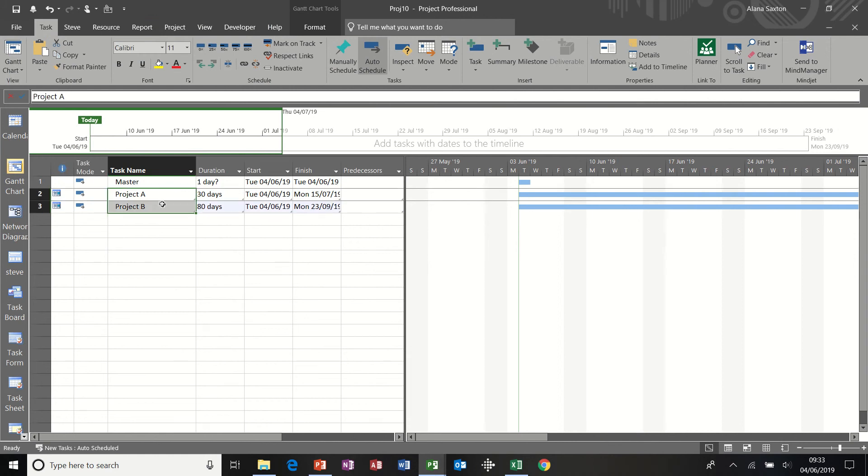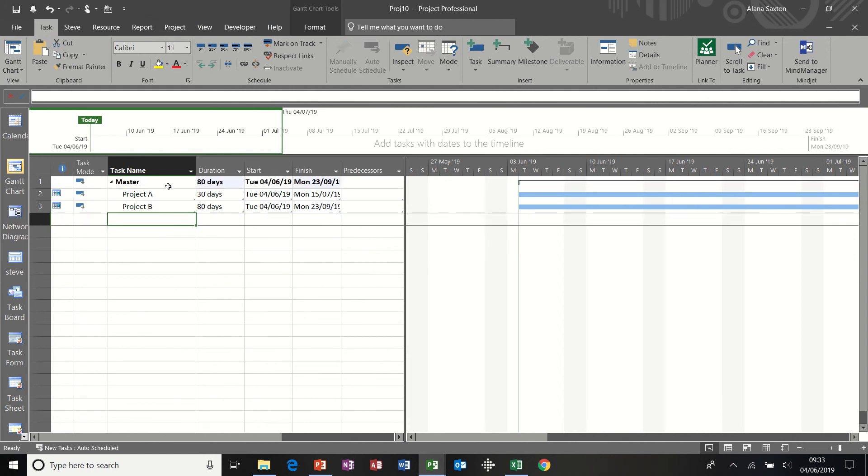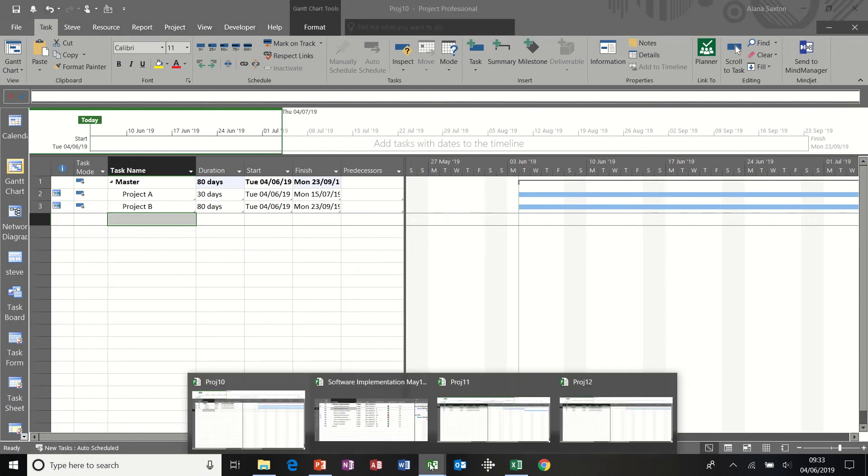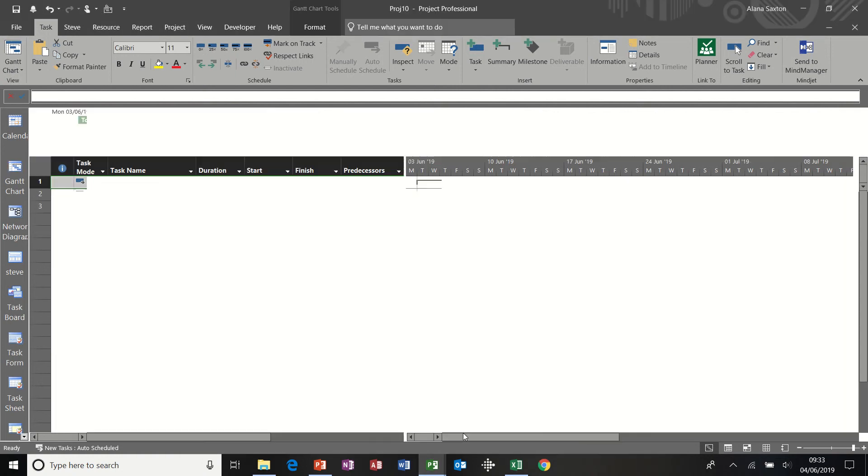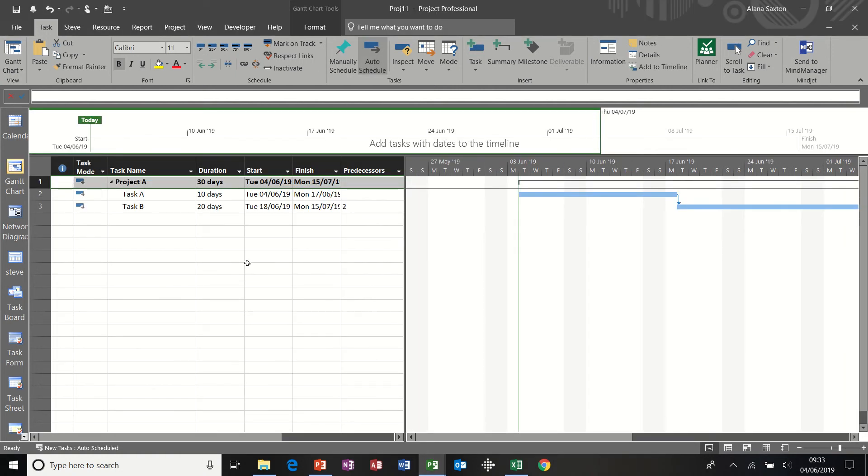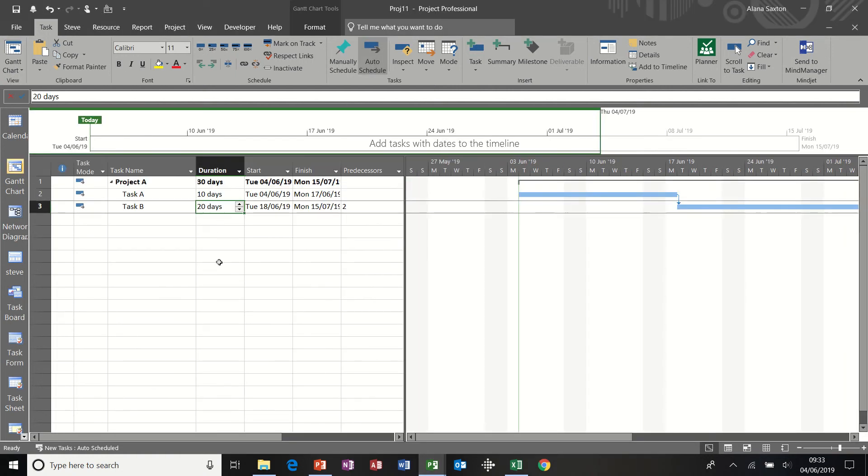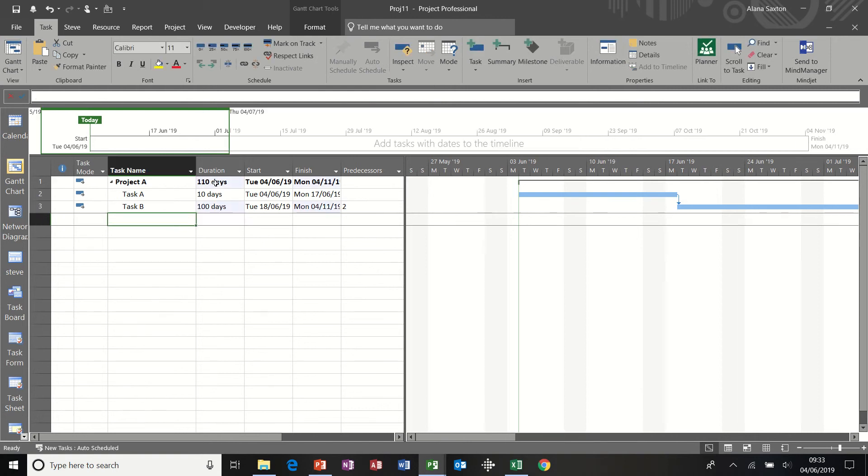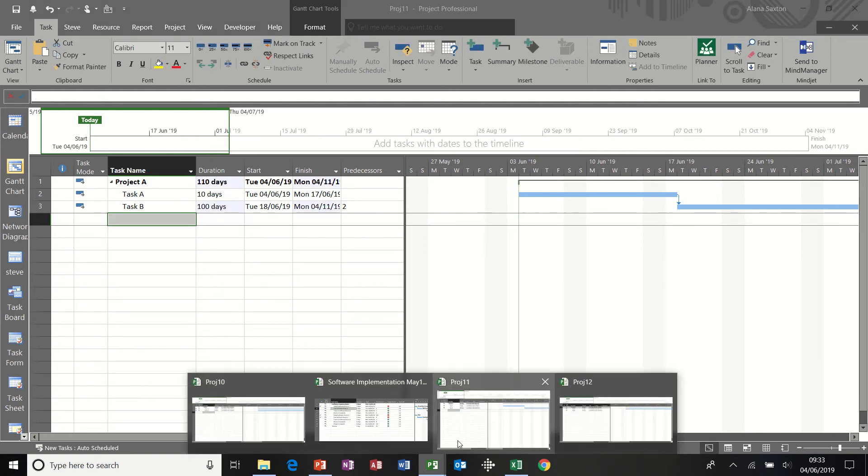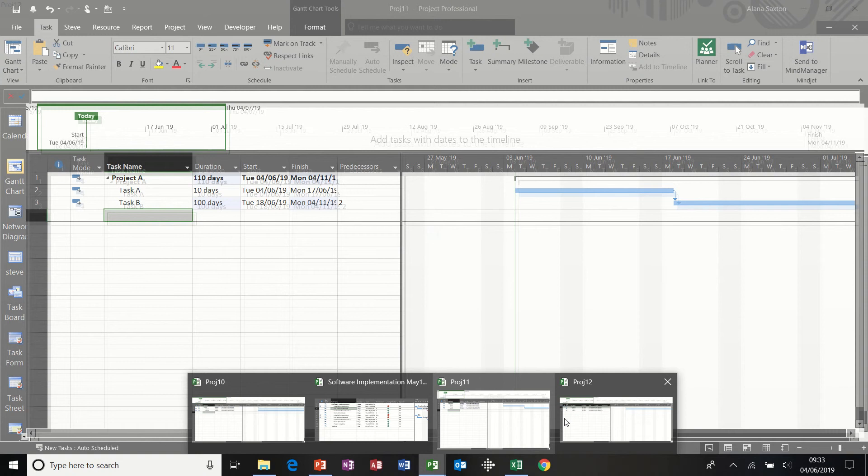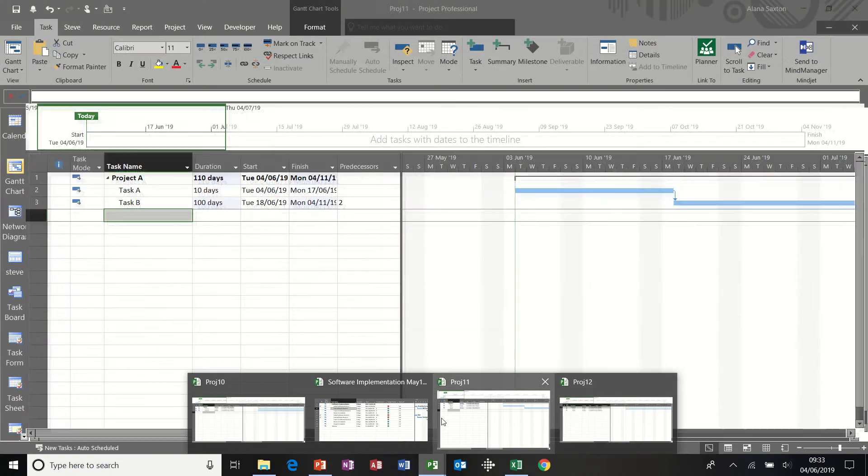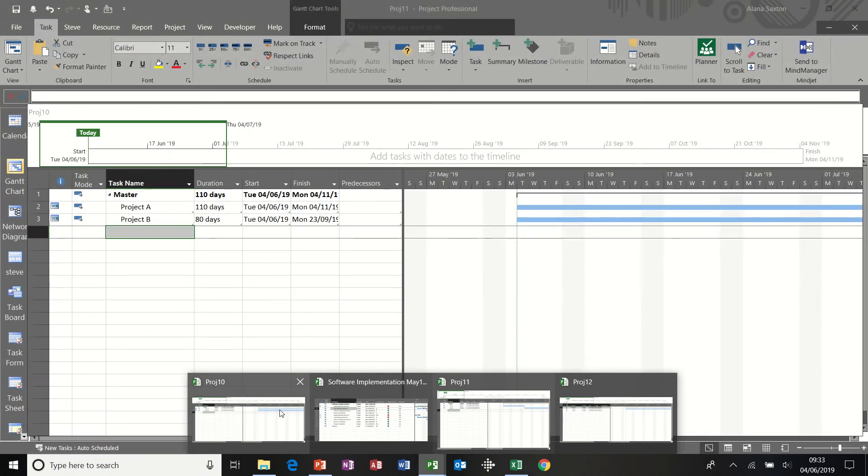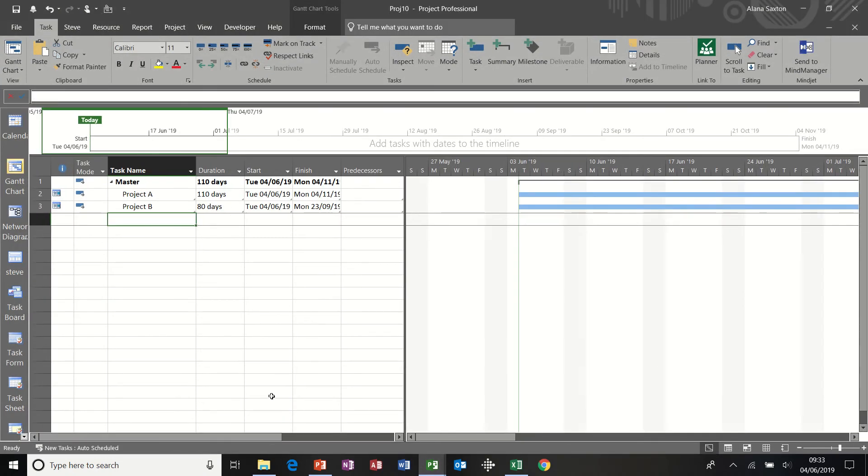And then I'm going to indent these two. So I've got an 80 day overall total. But if any of these projects change. So if I go into any one of these. Project A. Change that to 100 days for example. That's now 110 days altogether. If I come back into the master file.